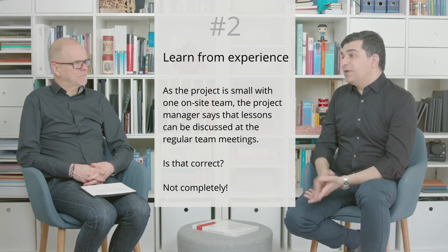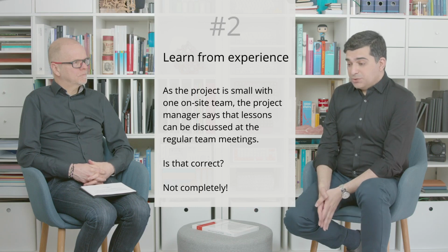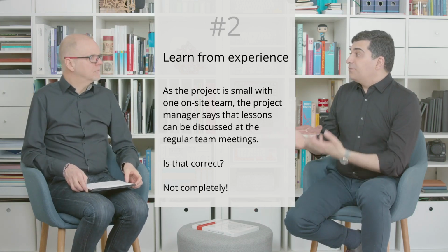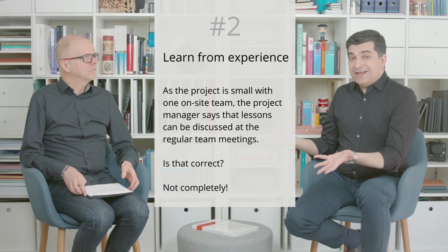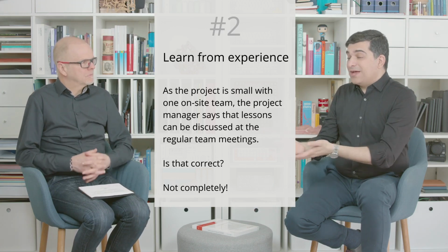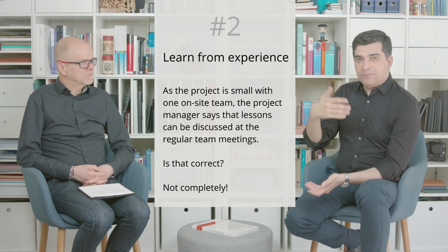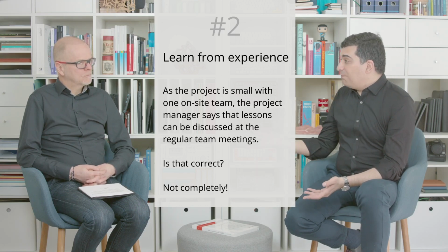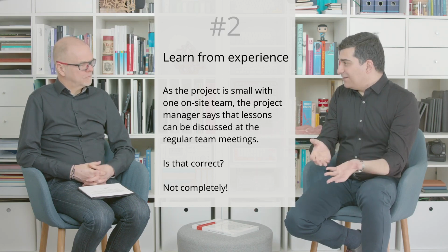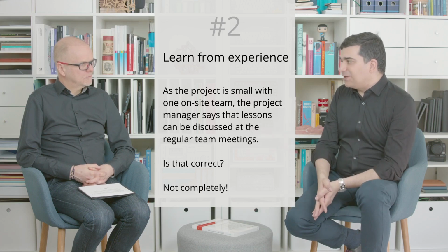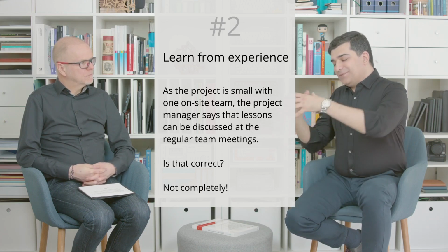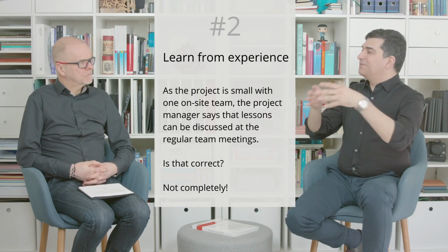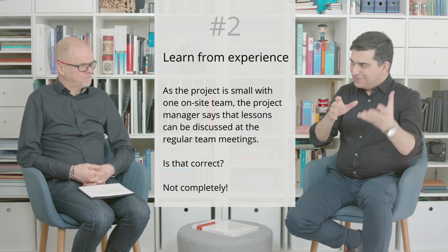So how can we do that? A typical thing is maybe you can review the lessons in that meeting, and if a lesson is really interesting, you can write it down and submit it somewhere. It can be a wiki, it can be a forum in the company, or maybe a bigger meeting at the end of the month for everyone in the company. Although that also helps spreading it in the company now, it won't work for the future. We also want to send it to the future people.